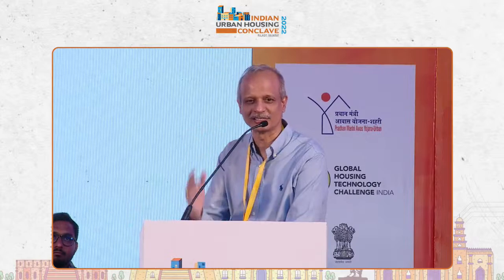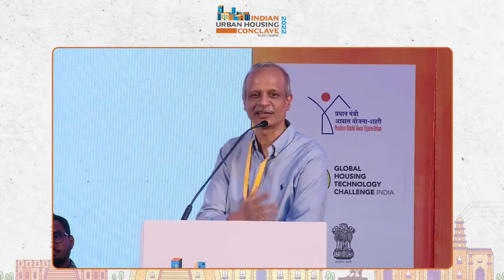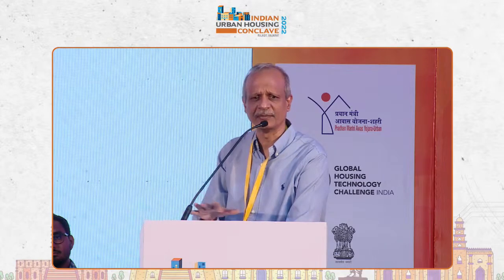When we were trying out GFRG technology, gypsum-based technology for housing, we were given an opportunity to do it in the IIT demo building, which we finished in 28 days, with a reasonably very good finish. A colleague of mine who has taken over as IIT Tirupati director decided, you have done that one, I would like to have 5 hostels and do it very fast, and I don't want any disturbance to the students who are already there. It was implemented within the duration promised. It was done by CPWD engineers who were supervising, and by an ordinary contractor who is not well versed and was not willing to take the risk, so we had to give support. We worked with the factory people: we'll pay directly, you don't worry about it. So once we make a commitment like that, it is possible.